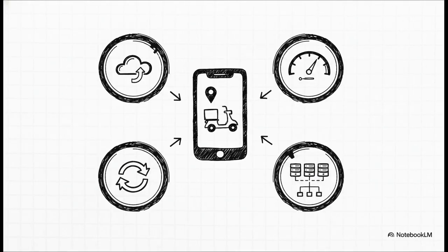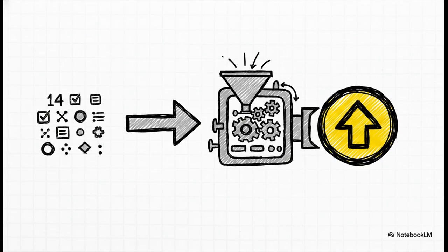This reality check has a name, the Value Adjustment Factor, or VAF. And how it works is, we rate the project on 14 different general system characteristics. For our food app, things like real-time data communication, high performance, and complex back-end processing are absolutely critical, so we're going to rate them high. This process is how we capture all those non-functional requirements that create a ton of extra work. We take the total score from all those 14 ratings, and we plug it into this simple formula. Don't worry too much about the numbers themselves.